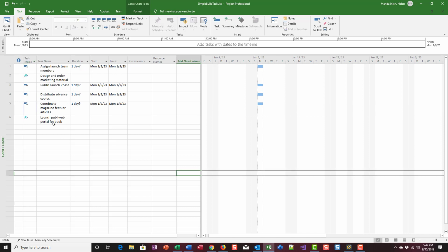There are two different ways to do that. If we take a look at the next step, switch the plan to make all new tasks automatically scheduled. We want to make all new tasks within this project, not all projects, automatically auto scheduled, rather than manual.